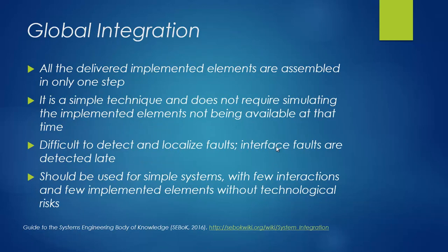The integration strategy could be selected due to the global nature of the integration. So, global integration requires that all of the delivered implemented elements are assembled in one step. This technique will not require simulating the implemented elements not being available at the time of the implementation.